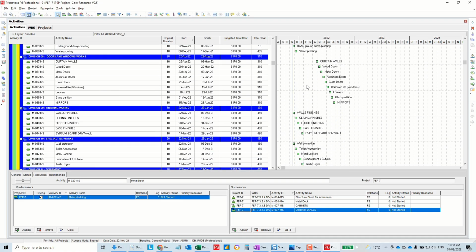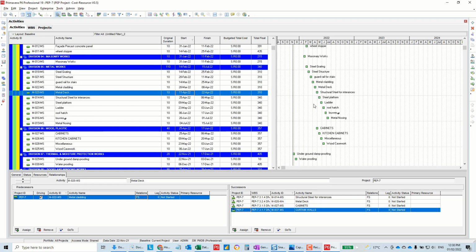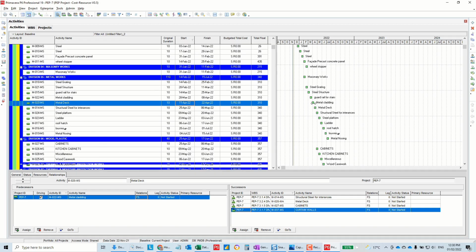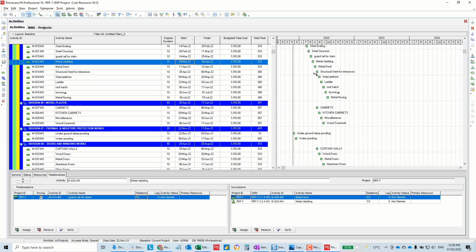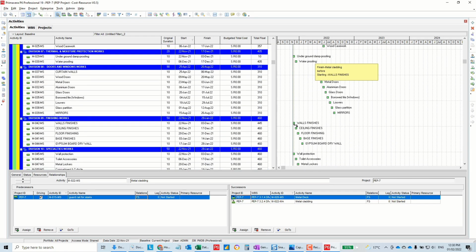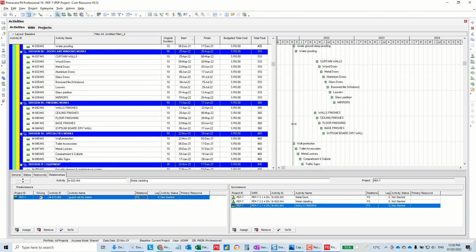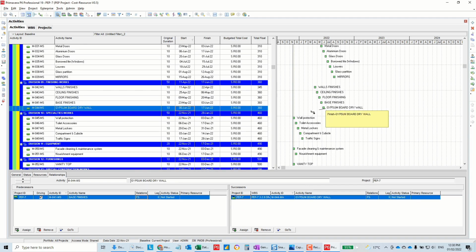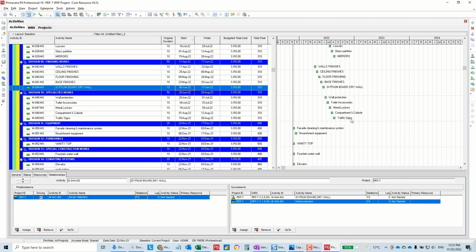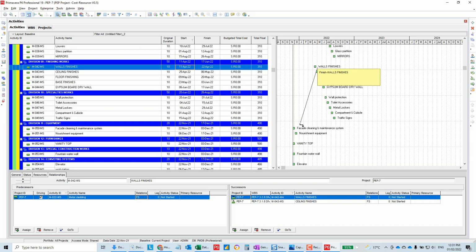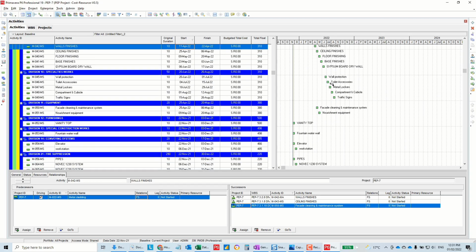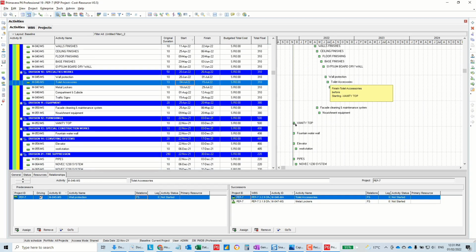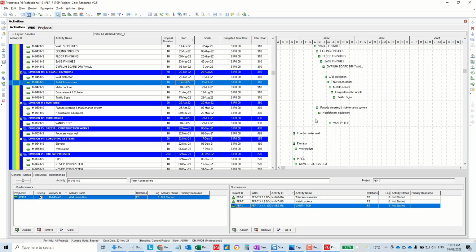We have wall finishes here. Also, we can say after this stage. I'm taking a time frame, not the activity itself. Wall finishes, ceiling finishes is okay. Gypsum, then we have wall protection, traffic signs can be later on. We can say this one after this one. Vanity top is, let's say, with toilet accessories. If you have any logical relationships, you can put them here.